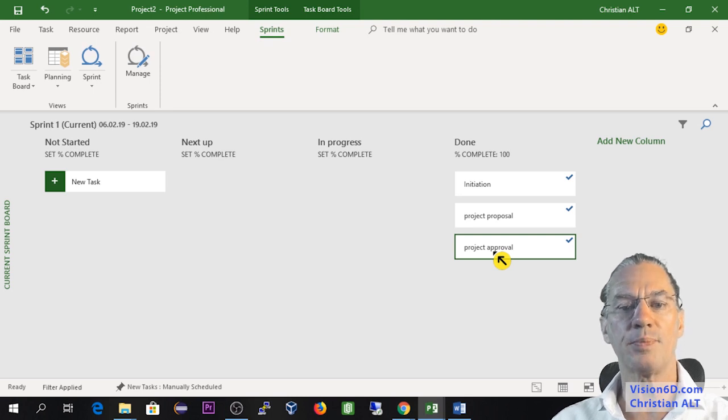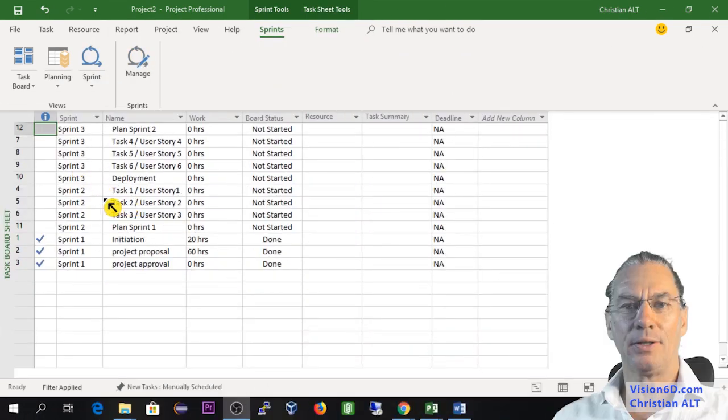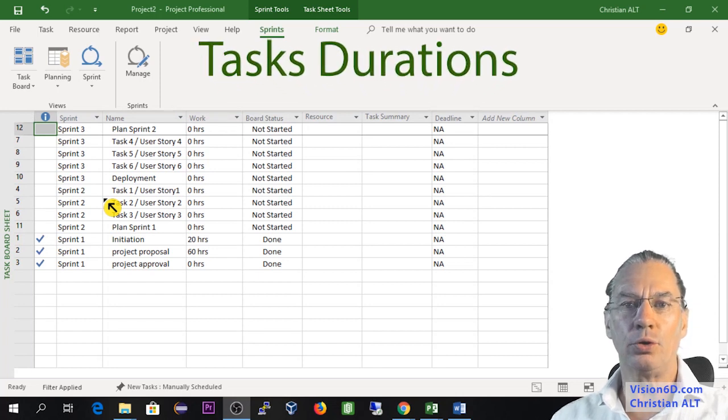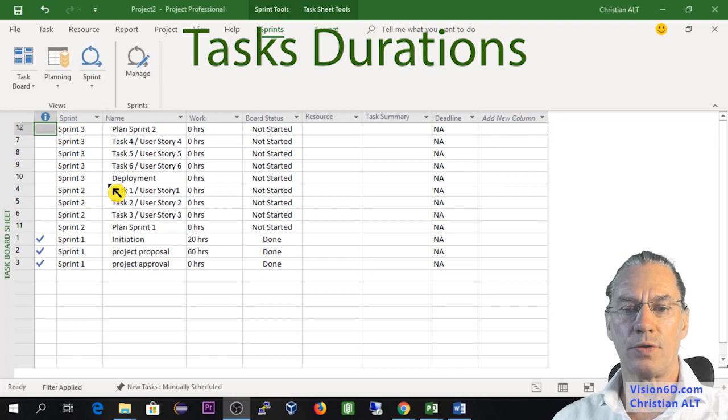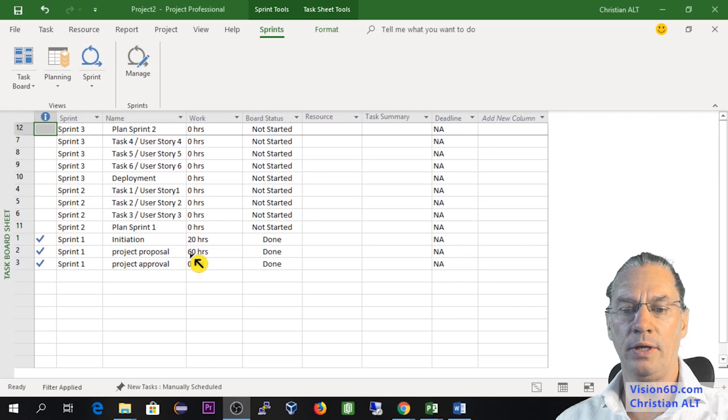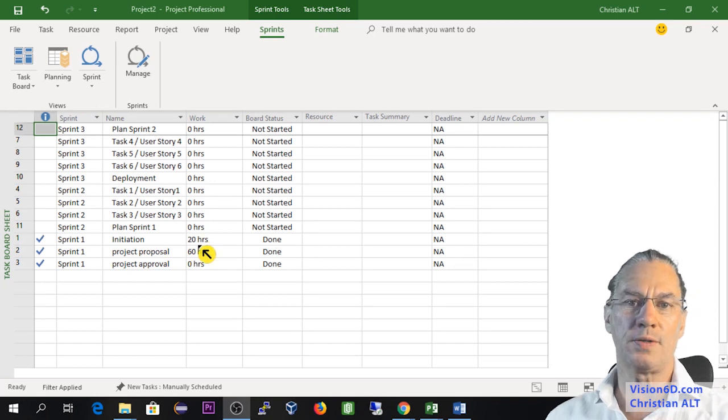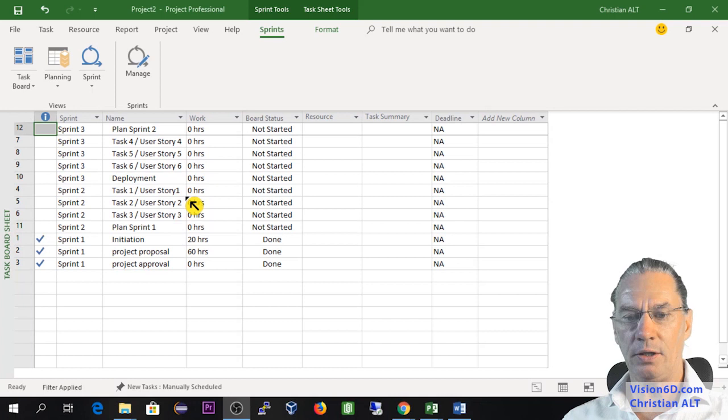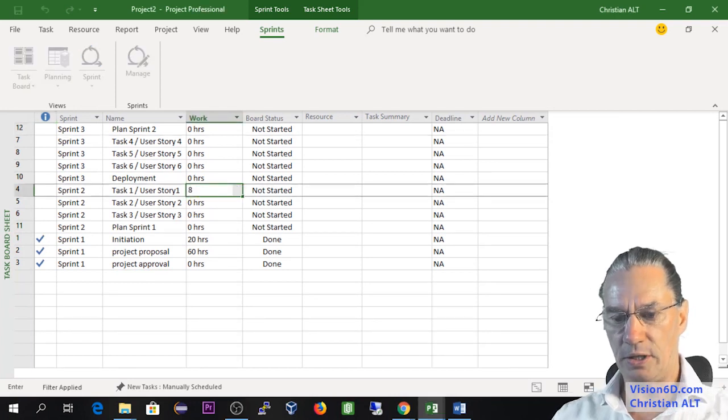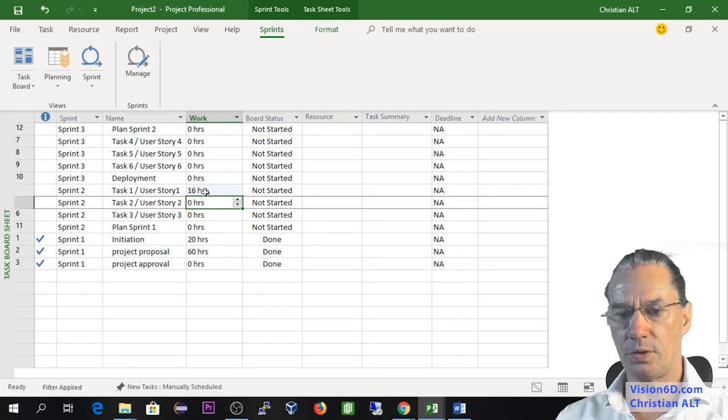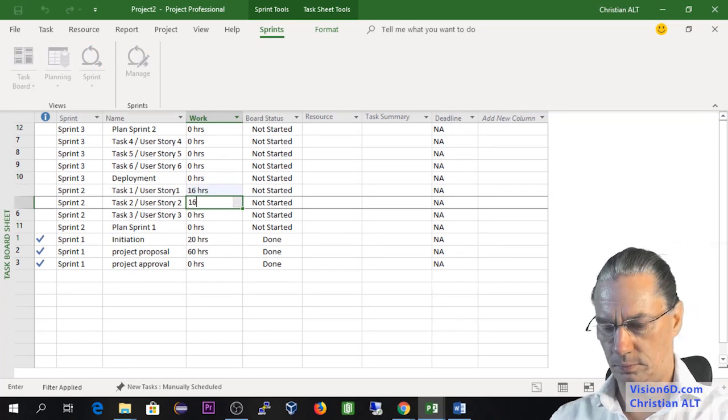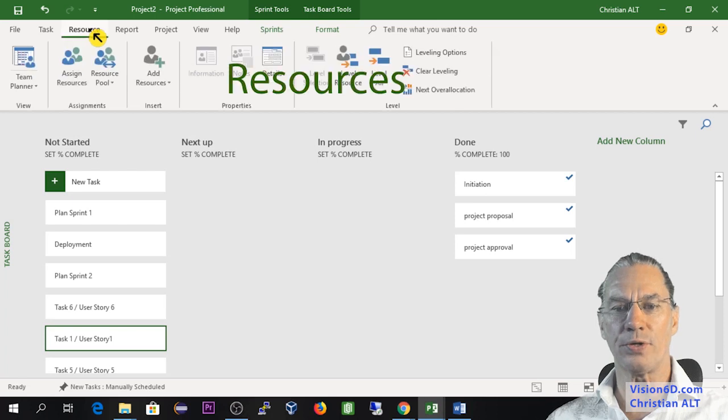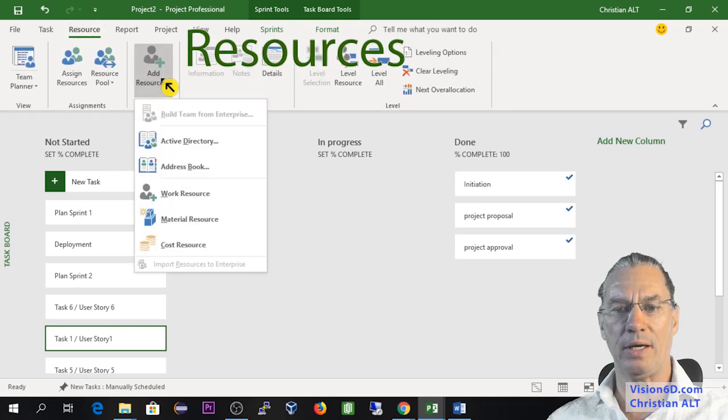Now I'm in the task board sheet and I'm going to look with you for some durations of the tasks. You see here initiation and project proposal had taken about two weeks, so it's about 80 hours. I'm going here to say that the first task is going to be done in 16 hours. How will I do with the other tasks? How to give some resources to that kind of project?